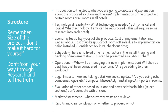Operational feasibility: who will be managing the new implementation, and will they be paid to do so? Has that been considered as an economic cost, and are you adding to their workload — because remember, they don't want to add to workload. You can't simply say a receptionist will manage this without considering that they need training, which needs paying for, and they need time taken off their other job. If they do 42 hours a week and need four hours to manage this, those four hours need covering by somebody else — so operational and economic go hand in hand.